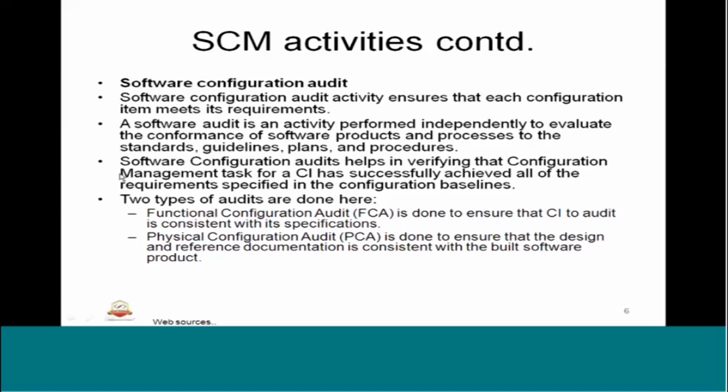Software configuration audits help in verifying that the configuration management task for a particular CI has successfully achieved all of the requirements specified in the configuration baselines. So the configuration baseline will be identified with the details in the configuration management plan. All of this will be verified against that.